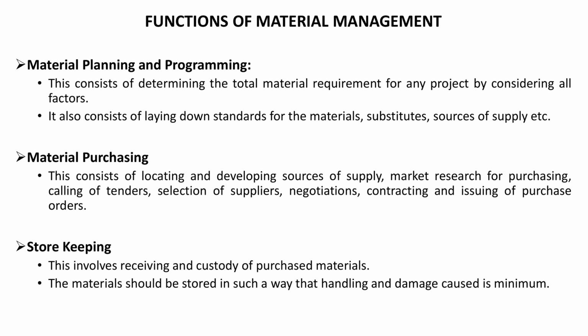The second function of material management is material purchasing. Material purchasing consists of locating and developing sources of supply, market research for purchasing, calling of tenders, selection of suppliers, negotiations, contracting, and issuing of purchase orders.